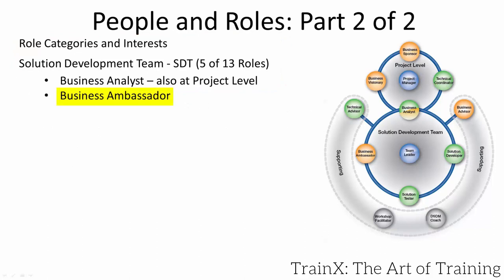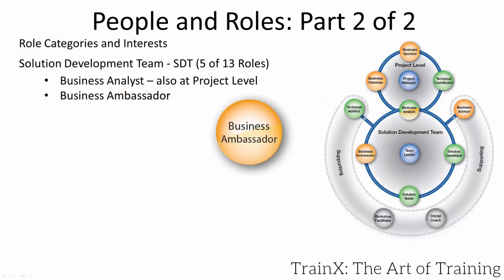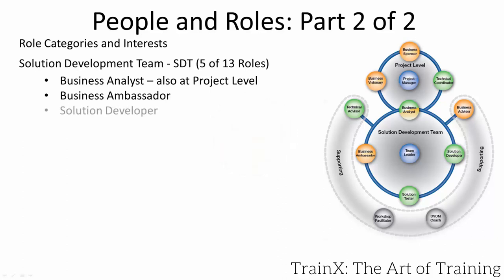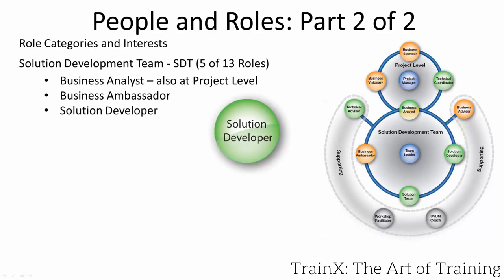The SDT role of business ambassador is someone from the business who can make immediate and empowered decisions on behalf of the business. They could de-scope a could, and depending on the management approach definition rules, potentially a should also. This allows immediate decisions to be made — such as the location of a logo on a marketing brochure — rather than through a lengthy change control process. The solution developer, typically three or four holding this role in the team, would be a software developer in our case study.